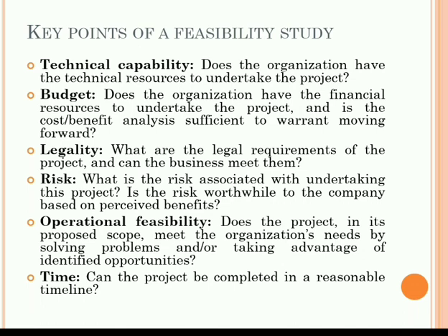The feasibility study in this project is an analysis of a potential need and expected number of patients, projected revenues and operating costs, such as staff, doctors and nurses. The project managers explored how to finance the project through a combination of financing from local financial institutions and donations from wealthy investors.